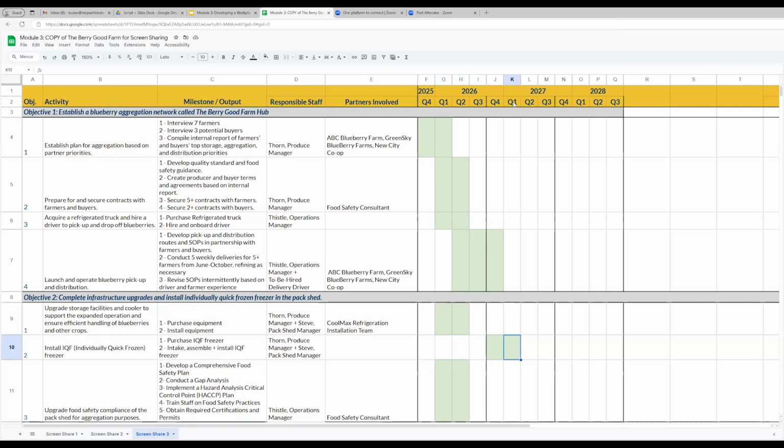That's about 18 months into the project. If this was a shorter style of grant that's expected to end in 18 months, 2 years, well, that's perfect. But if it's the USDA program that's expected to take 3 years, like we have listed here, well, then this project likely is not ambitious enough. You've got a whole year and a half that it wouldn't take that long to complete these activities. You really can complete them in 18 months.